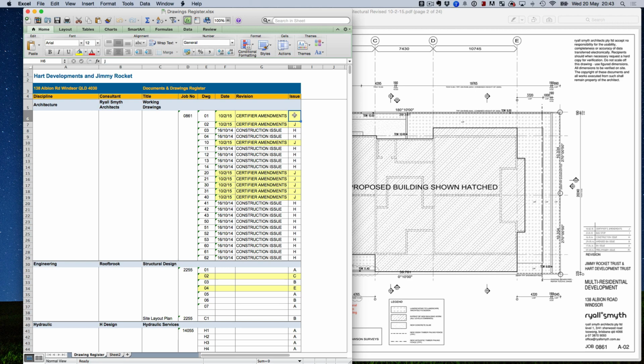So you've got to have your own drawing register that you keep with you, so that when you receive new drawings from your architect, and you are issuing them for tendering documents or for building, and you're signing the contract, those drawings have to be exactly the same, because they've got to build to the final or the latest drawing that you have received. And the only way you can track that is if you track them by their drawing numbers.